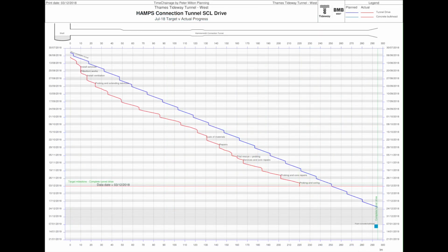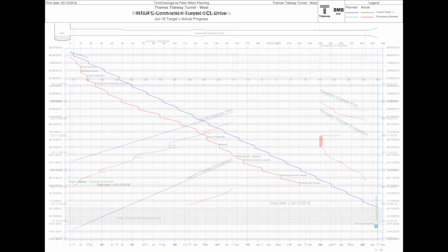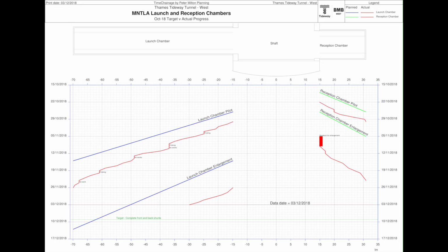The second method involves adding progress activities in the actuals form. Tasks in the actual form are not linked to planned tasks other than through the WBS and activity codes, so the plan is not changed in any way by adding actuals. Actuals can then be compared with the plan or indeed any saved baseline.